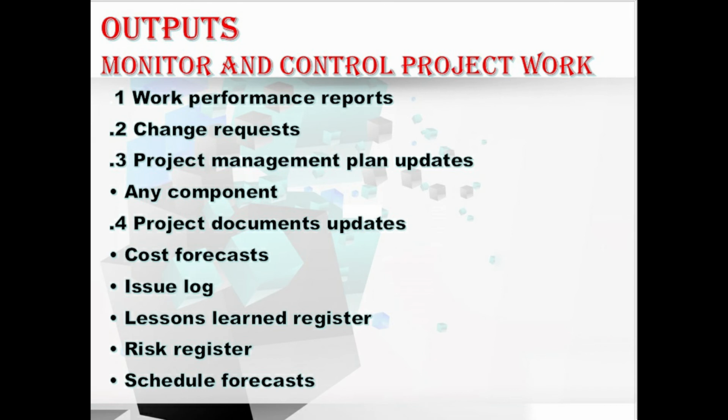We have project management plan updates, which includes any component of the project management plan. Let me explain. Any change to the project management plan goes through the organizational change control process via change request, that is PICC process, perform integrated change control process. And the changes identified during this monitor and control project work process may affect the overall project management plan. Okay, hope you understood about this project management plan updates output. Let's move to the next output.